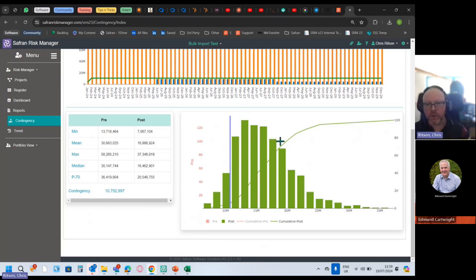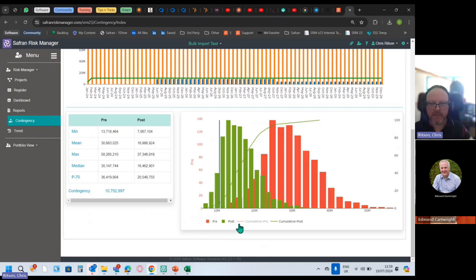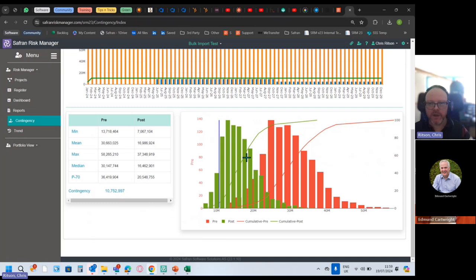If that blue bar was all the way up here, say, I'd have P85 confidence that, assuming we complete the mitigation measures, it's going to be all right. If I bring back in my pre-mitigated view, that P85 here is actually only about P10 pre-mitigated. So again, urgency around the actions, completing them, because if we don't, then we have to assume we're in the red picture and not the green picture, and the red picture is so much worse.